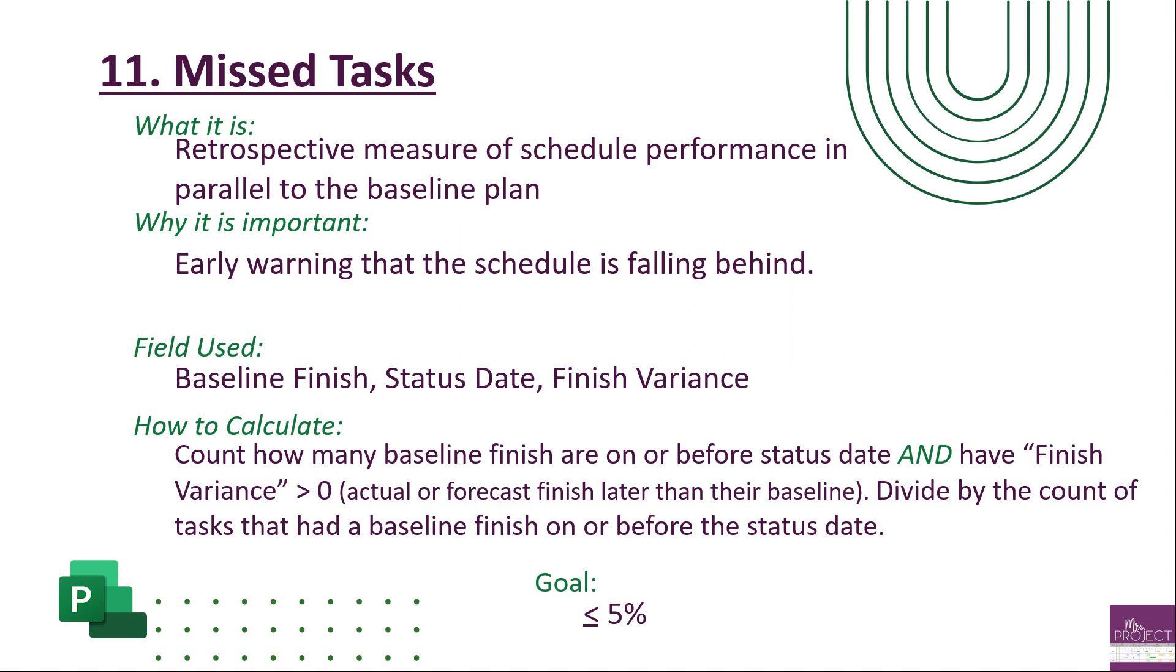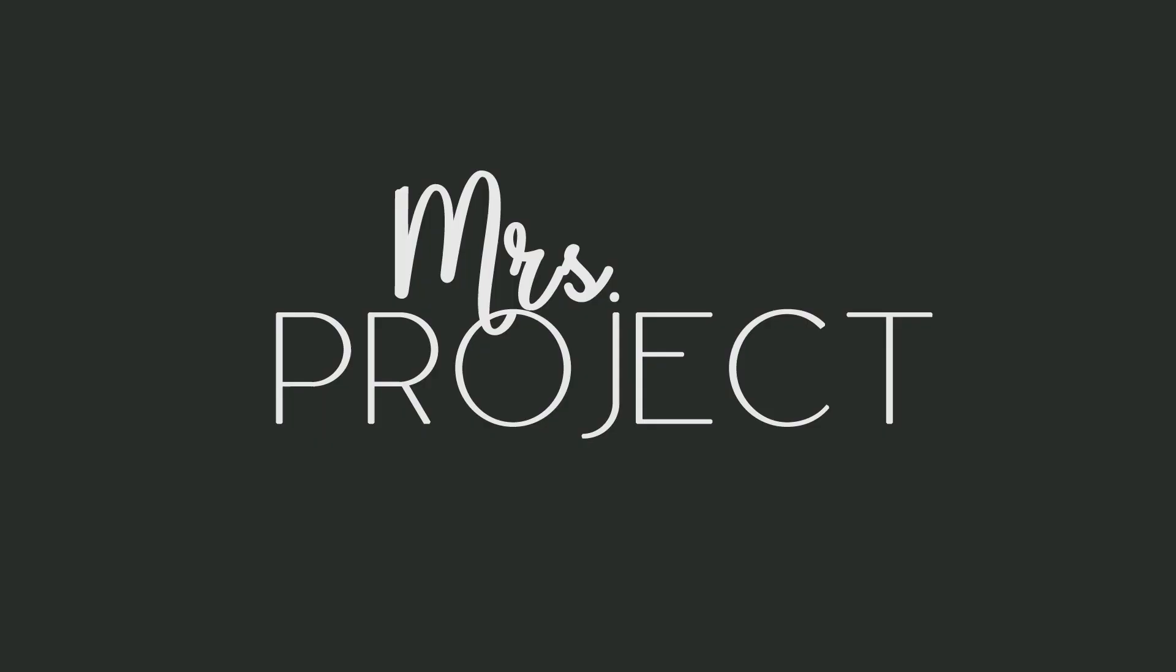This metric is an indicator. The closer you are to 5%, you're executing close to your original plan. But the higher this metric means you've missed a lot of your original dates and won't finish your project on time. Keep in mind that this metric is not looking at the variance number. Even if you missed a task by one day or even a week, it's triggered by this metric. So it's really sensitive. It's not going to tell you how far off you are from your plan, but just that you missed it. If you missed it by one day, it's triggered by this metric. So keep that in mind.